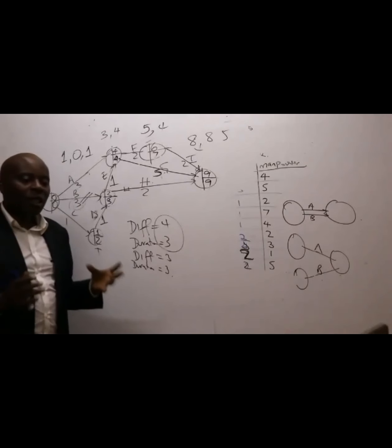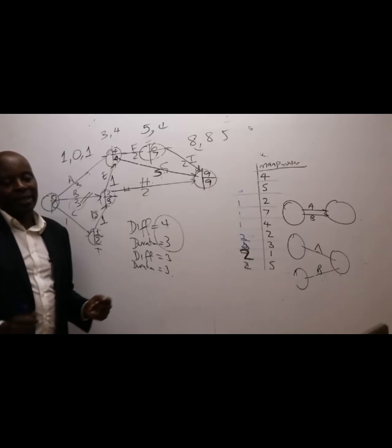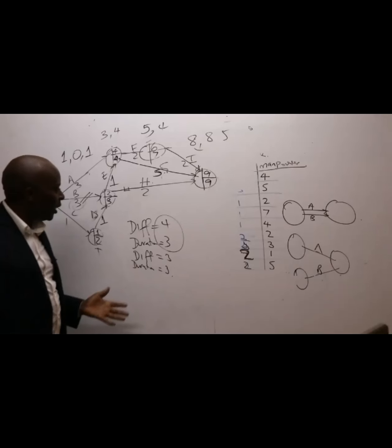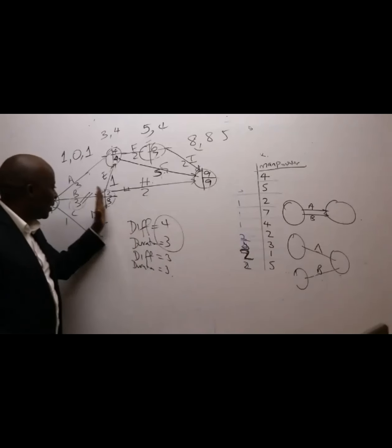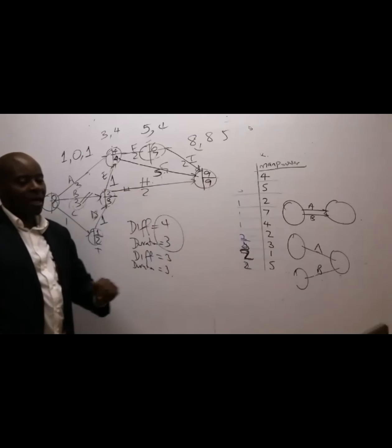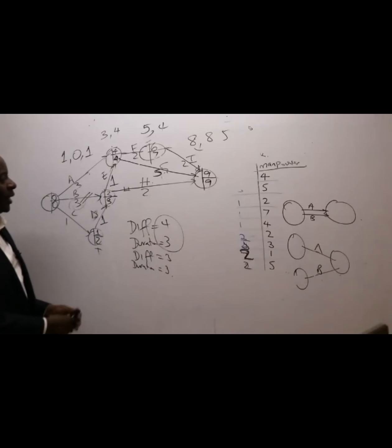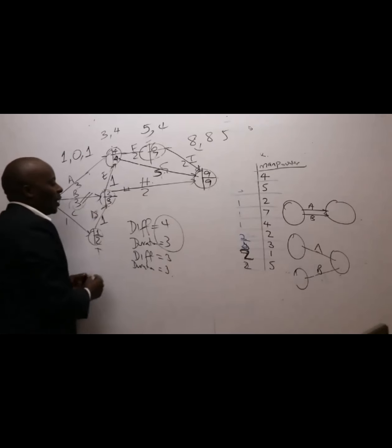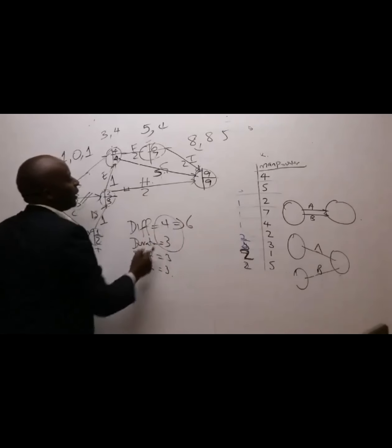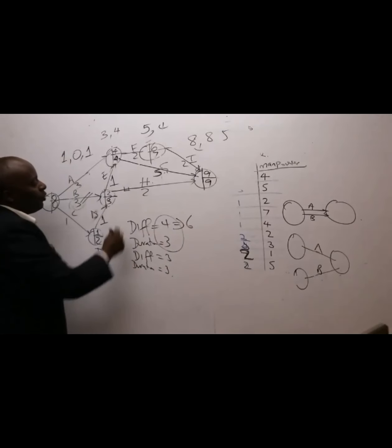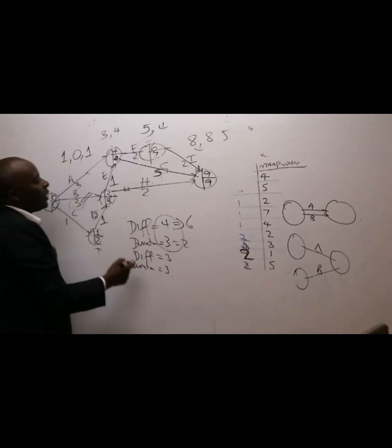Gertrude says it's not critical. Why is it not critical then? Could you kindly help me? Sharon, why are you saying that H is critical when I can see 3, 3 and 9, 9? I can see that coincidence. Why is it not critical? Duration is different, yes. If you take 9 minus 3, the difference is 6, and the duration of H is 2. So in this case, H is not critical.